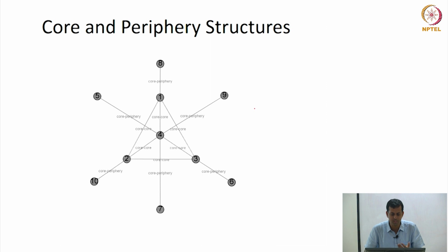And so this is again a very interesting kind of structure. It's similar to that star structure, but it's called the core periphery structure, and this is a structure that we see very often on infrastructure projects. There's a small core of people right at the center of the network making a lot of decisions, right? And there are all of these actors on the periphery. All the actors on the periphery don't know each other, right? They are often connected to certain members of the core network, right?